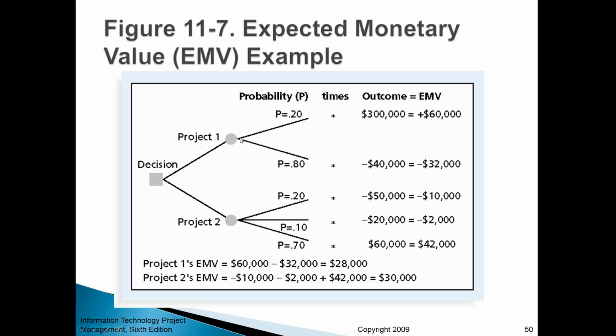But again, this decision tree analysis can be more complex. There could be branches coming from the first level branches and so forth. And then there are those elaborate techniques for doing all those calculations and trying to understand the probabilities, because if you have a probability here, then it becomes a probability that is dependent on this probability. So there are some rules, the so-called conditional probability. So there are the rules for calculating those conditional probabilities, and then formulas for estimating the entire monetary value of a particular project.